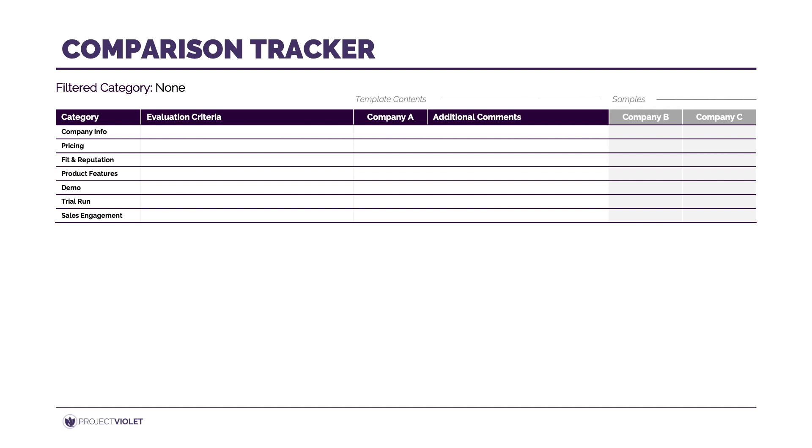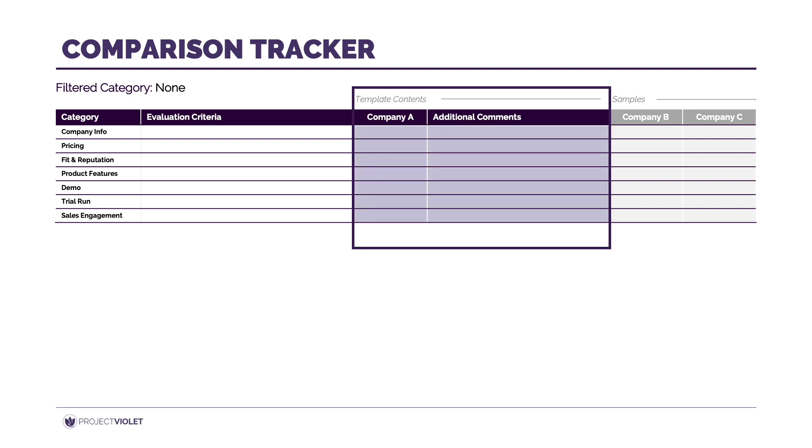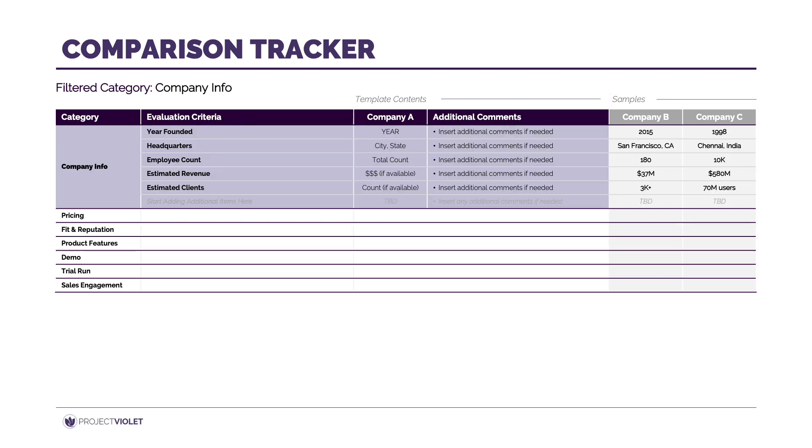As you begin your research, you'll want a way to keep track of what you're finding and remember why you're moving one vendor forward and eliminating another. We have a template in our toolkit that documents these items, starting with four categories: company info, pricing, fit and reputation, and product features. These can be discussion points you use with your team as you share research, helping track findings and filter down vendors with the same criteria. The template is in Excel, but we'll use slides to explain the components, with sample fictional companies shown side-by-side.